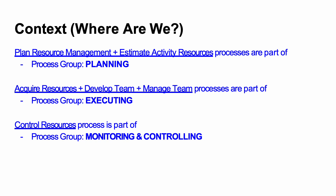Let's pause to see where we are. I always like to ensure that we understand a particular knowledge area's processes in the context of process groups. We know that there are 10 knowledge areas and five process groups, and processes within knowledge areas can be mapped to those process groups. The five process groups are initiating, planning, executing, monitoring and controlling, and closing.